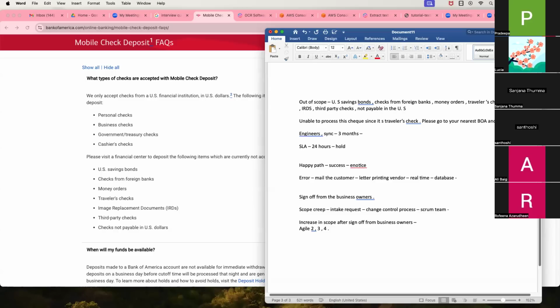Just for the business requirements, you're going to take the sign off. Technical requirements, I mean, whatever is the top priority user stories for the next 2 to 3 sprints, are already in ready status. So our developers will groom every user story in sprint review, right? So they'll be fine doing it. But you have to get sign off only for the business, that BRD or maybe the high level epics, but not every single sprint.